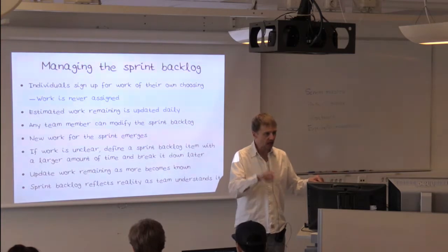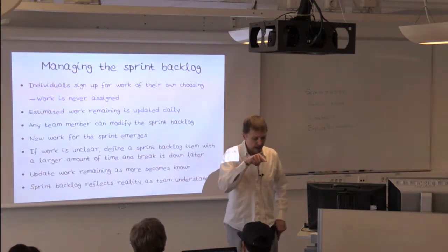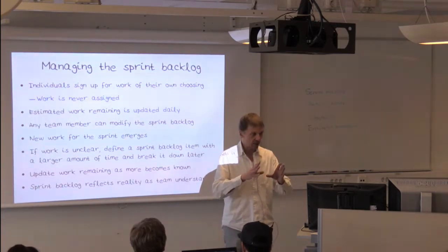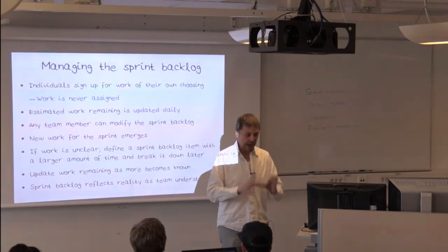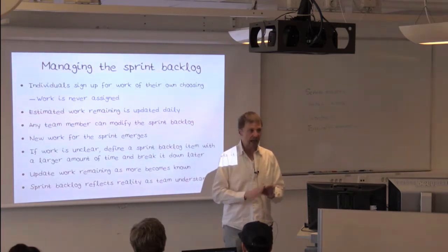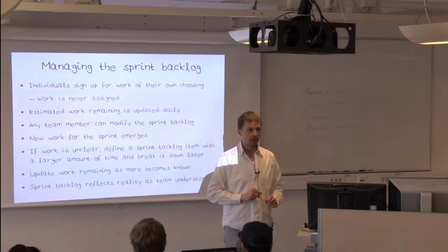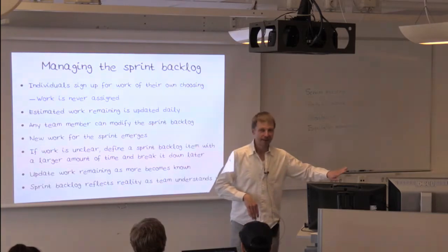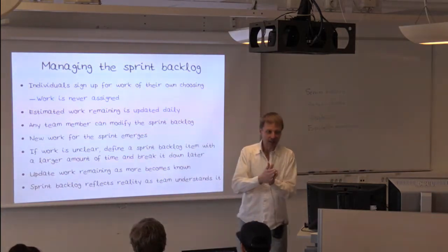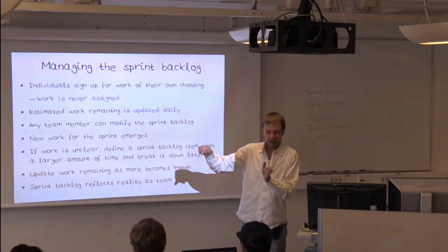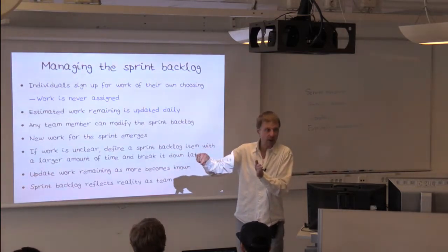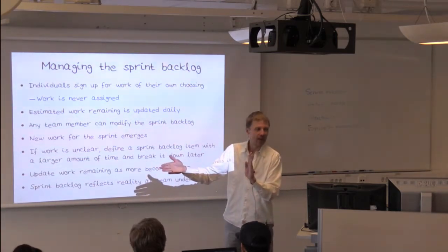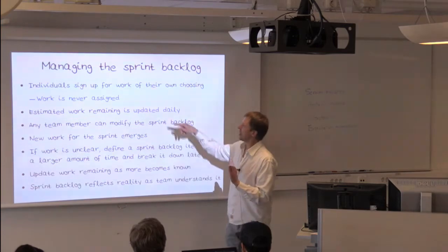At any point in time, if I sum up the remaining time estimates for the tasks that are not done, that should, to the team's best understanding, reflect reality. I'm not interested in what happened in the past, because it's gone, right? I'm only interested in how to get to that goal. And what determines whether I can reach that goal or not is how much I have left, not how much I've done. How much do I have left? So it's critical to always change.